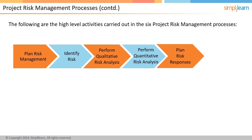The sixth and last process is control risks. This process focuses on implementing risk response plans, tracking identified risks, monitoring residual risks, identifying new risks, and evaluating risk process effectiveness throughout the project. In the next screen, we will look into the flow of all six processes and how they work logically.